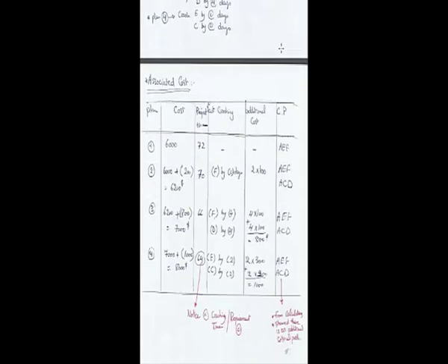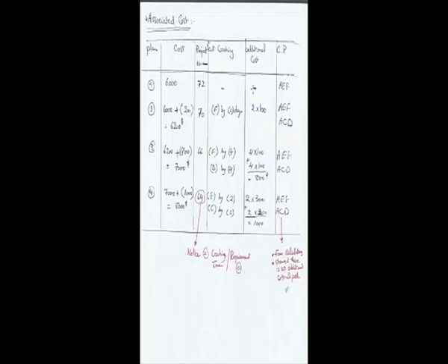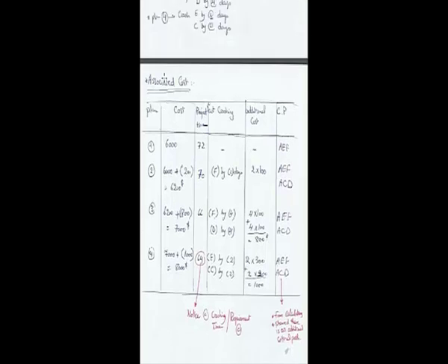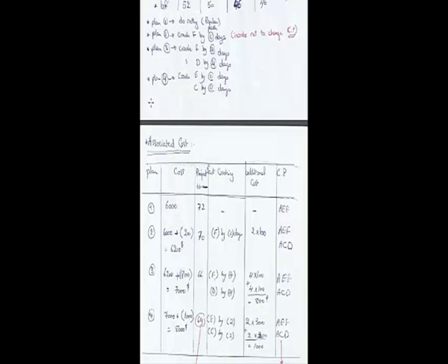Then we are supposed to calculate the associated cost. How we're going to do this is that we write our available plans. We have 4 plans that we have suggested. Plan number 1 is that we do nothing, right? So the project time was equal to 72 days. Secondly, the cost equals 6,000, which is the original cost, which we calculated at the beginning of the problem.